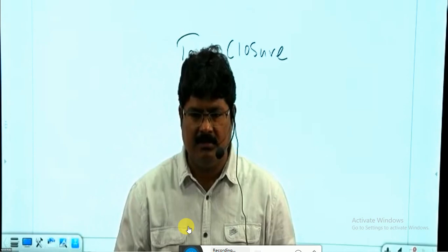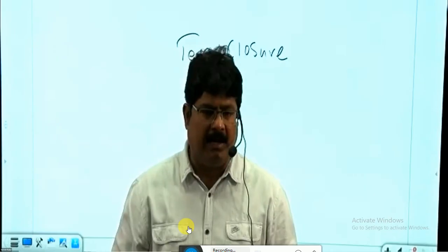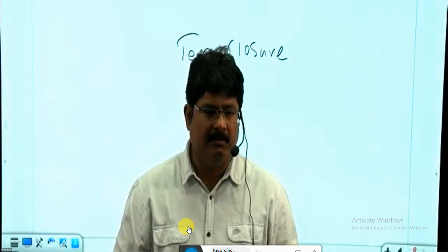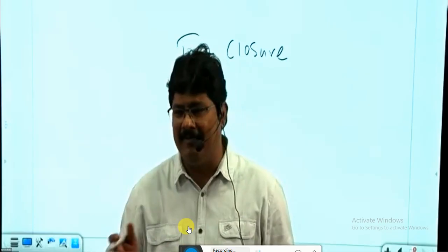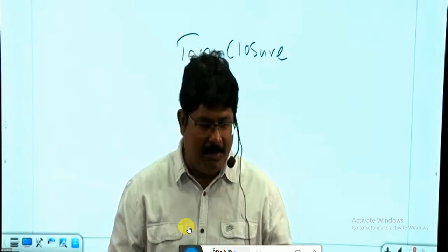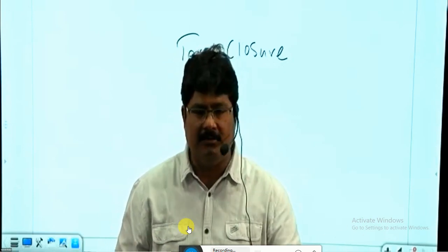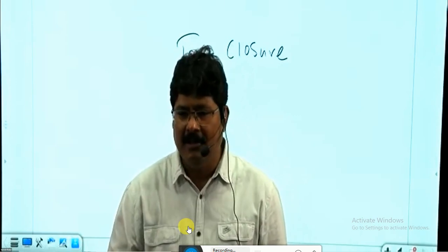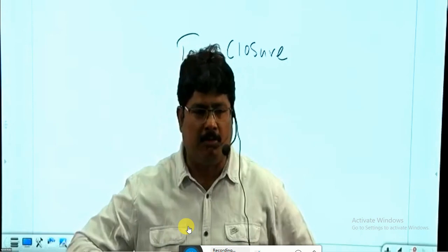Understood? So what if it is not resolved in the next phase also? If they are not able to fix the bug, I'll go for another developer. Not resolved, meaning one week of time was given. If that person is not able to resolve it, I'll go for an alternative resource, otherwise the project lead will sit and do it. If you are not compromising on this part, every week there will be a postponement of the schedules.